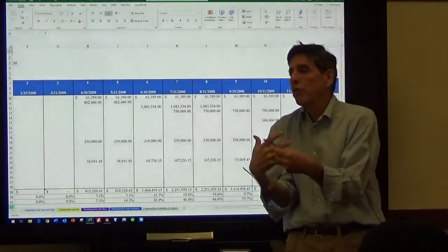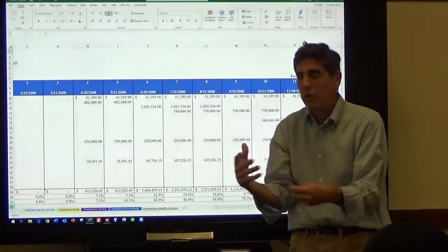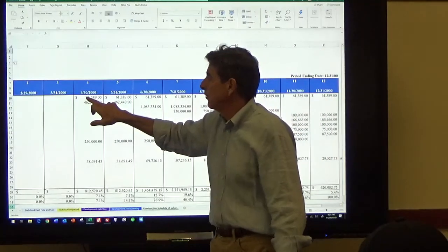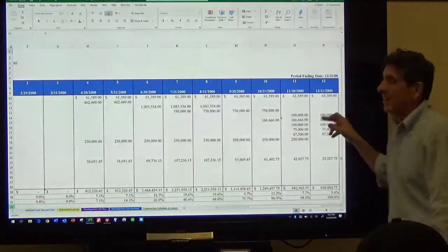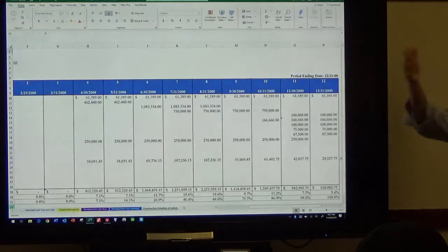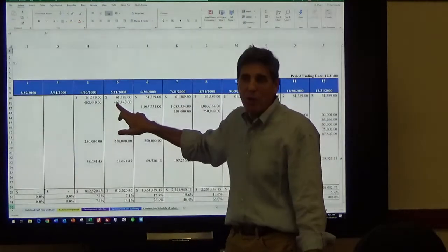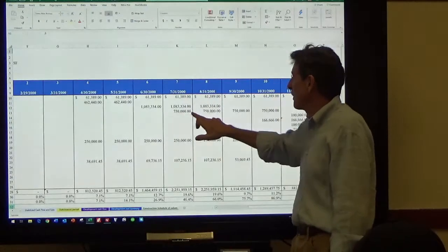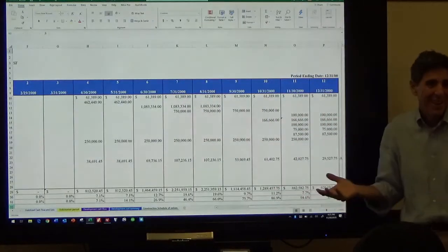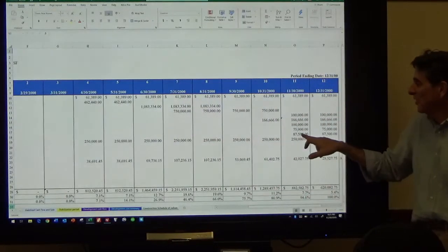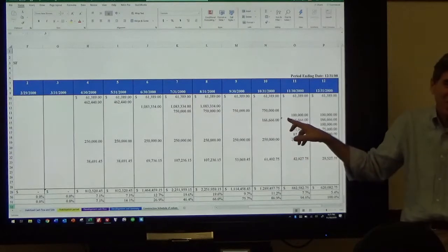That's where your own personal criteria and judgment goes in. General conditions, well, they're not going to change month to month, so I'm just going to divide those by the number of months out there. I'm going to do site work before I start going with concrete and metals, right? I'm not going to do doors and interiors until I've got all this stuff done.